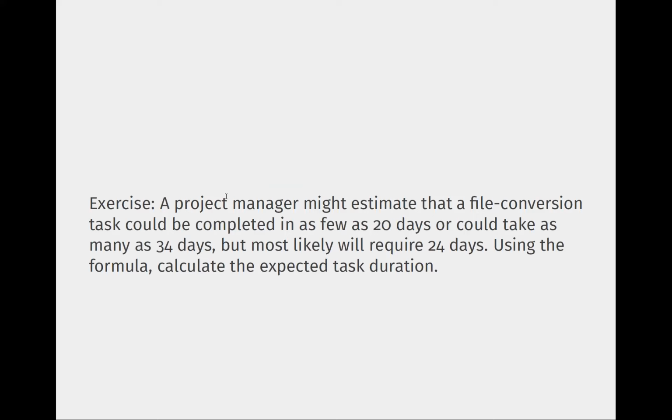Right. Small exercise for you to try. First of all, take down this question. Maybe you can take a screenshot of this. Then we can go back, and I will show you the equation again. Just put in the values and send me the answers in the chat. Okay, here is the exercise. A project manager might estimate the file conversion task could be completed in as few as 20 days or could take as many as 34 days. But most likely it will take 24 days. Using the formula, calculate the expected task duration.